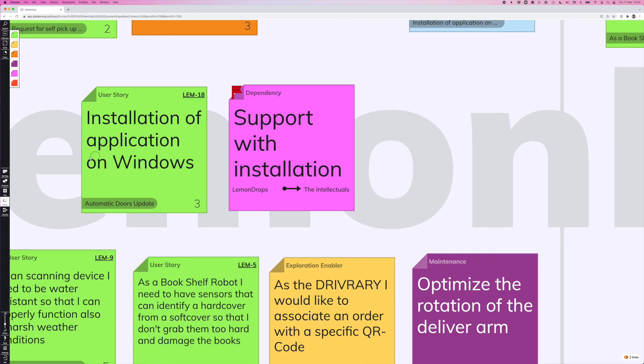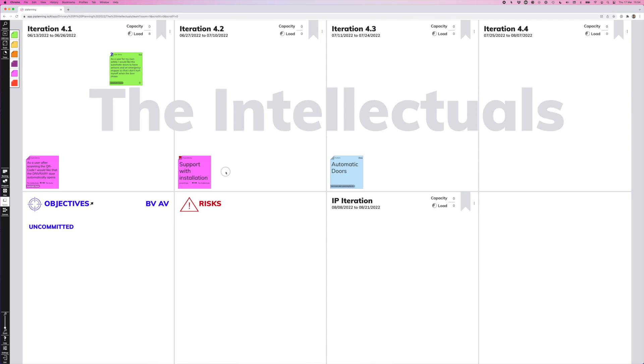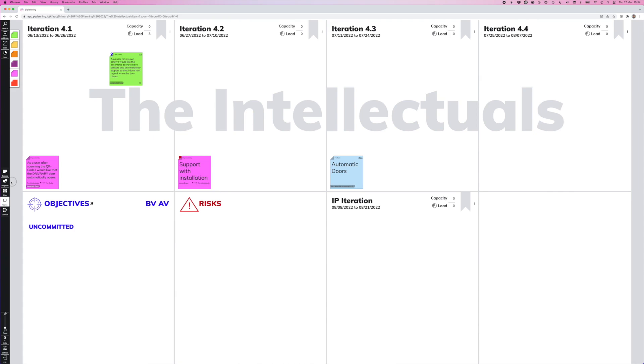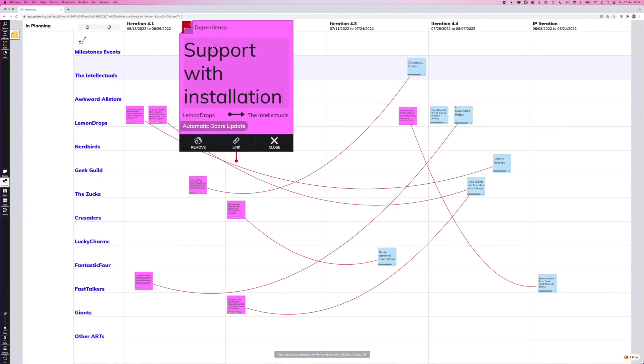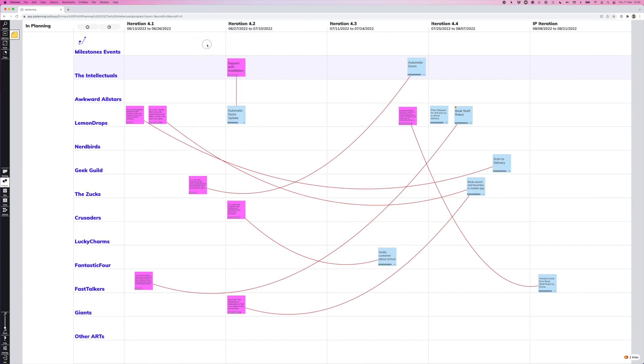Now let's switch over to the other team to see what happened on their team board. So they received the dependency in the exact same iteration where we sent it from. So they know we need that in this iteration. So they need to plan it out themselves, break it down into user stories. And once they know when they can deliver the dependency, they themselves can send it to the program board. Now this button changed from depend to program because now we can send it to the program board in order to visualize the dependency there with a string like we would on a physical board in real life like that.